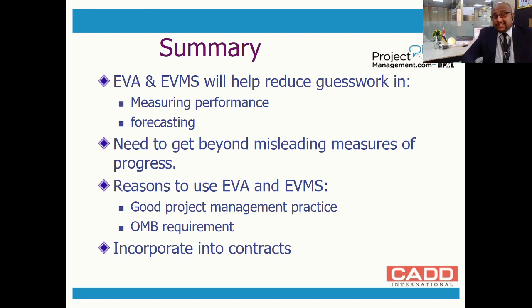It can also be incorporated into contracts because if you are in a contract, you have limitations and you are under constraints, and this will help you ensure that the constraints are achieved as per the scope of work. You are not being pushed too much against the wall with the contract because you have this measurement tool which will show that because of this reason you have the delay, so that you have an area where you can put up the claim saying that this was not my mistake, so this has to be rectified. The claim has to be appealed.